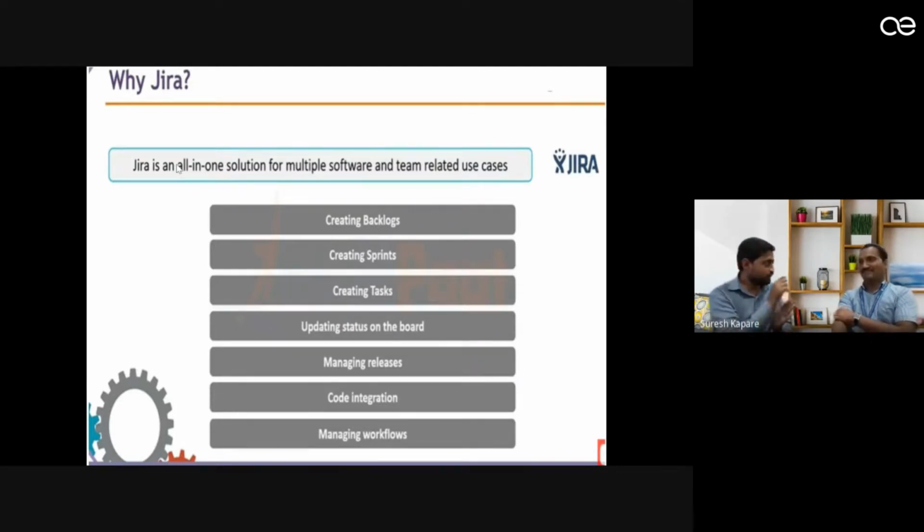Whenever we allocate a time to them, that becomes a To Do. Along with the time, we have to assign it to a particular person. Only then will it convert to the To-do list, and then the work will start: In Progress and Done.